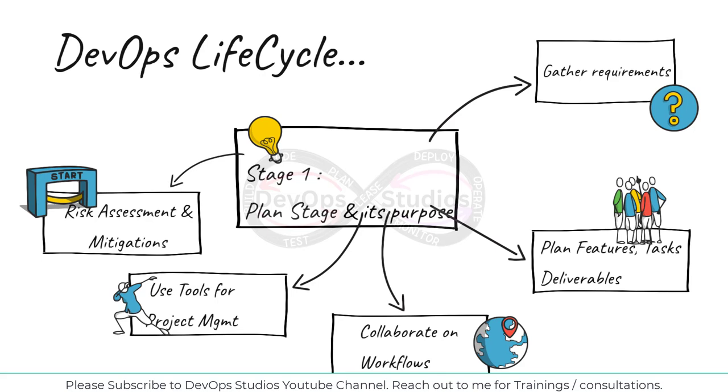And establishing the metrics. So you have to define your success metrics to measure the progress and outcomes. Say for example, I deliver sprint 1 with 0 critical bugs and 95% unit test coverage. And finally, the shared understanding. So all the stakeholders understand the project goals, the timelines and their roles.